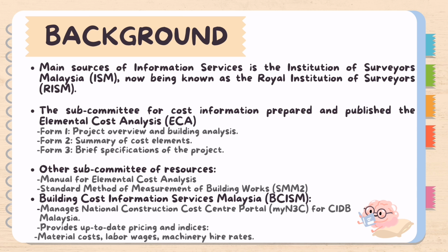Thirdly, the source of cost data is information services. The main source of information services is the Institution of Surveyors Malaysia, ISM, now known as the Royal Institution of Surveyors, RISM. Additionally, the Subcommittee for Cost Information prepared and published the Elemental Cost Analysis, ECA.